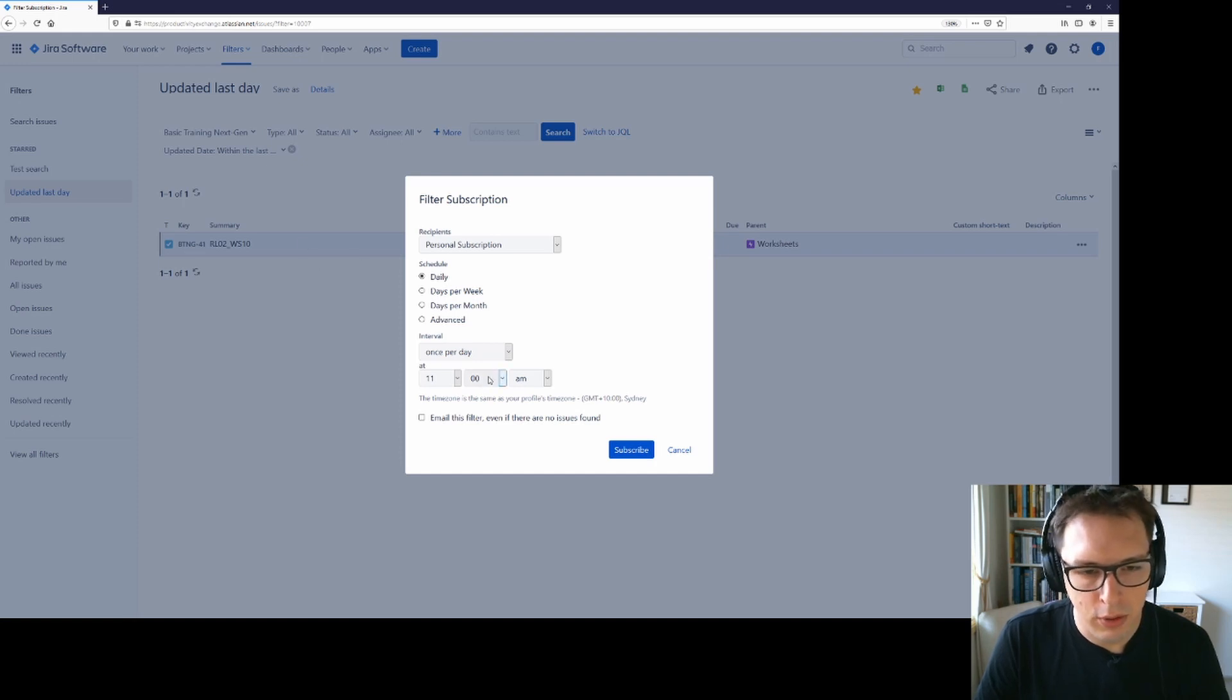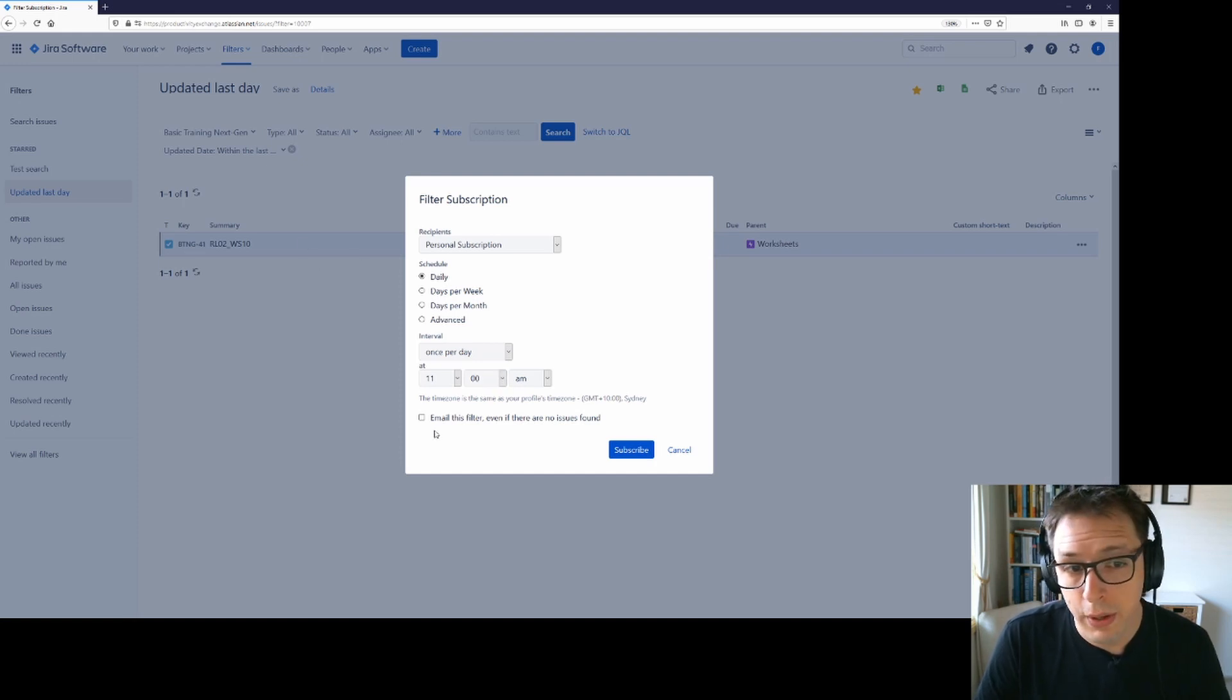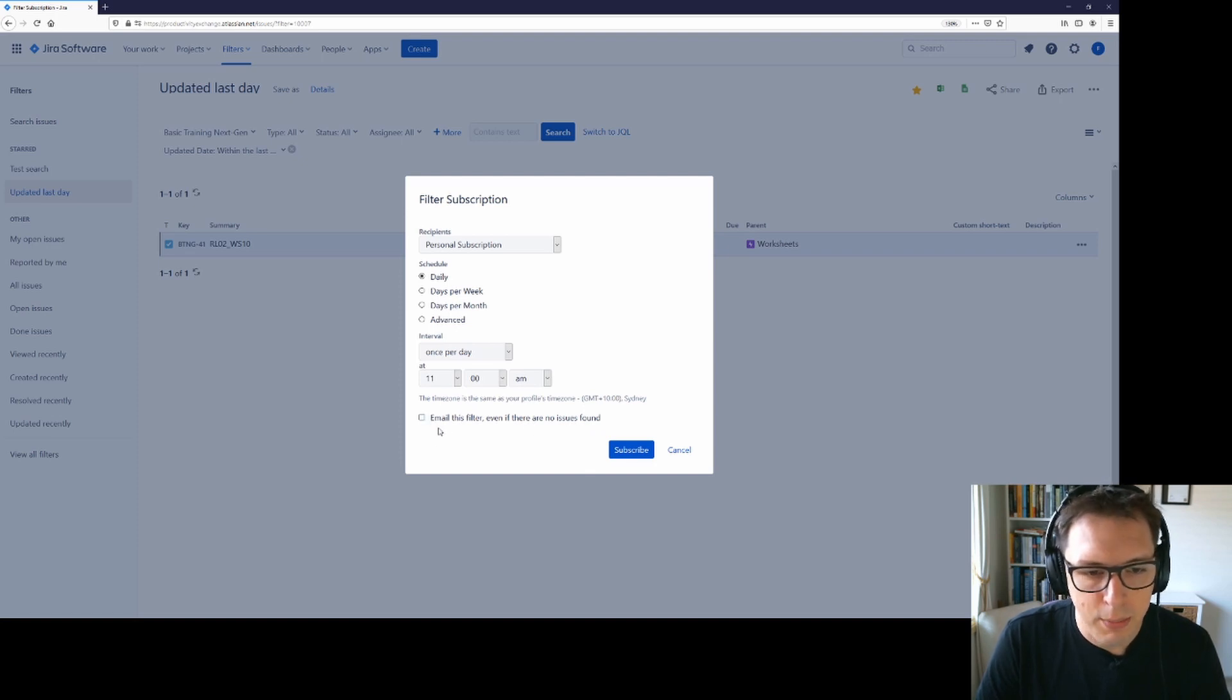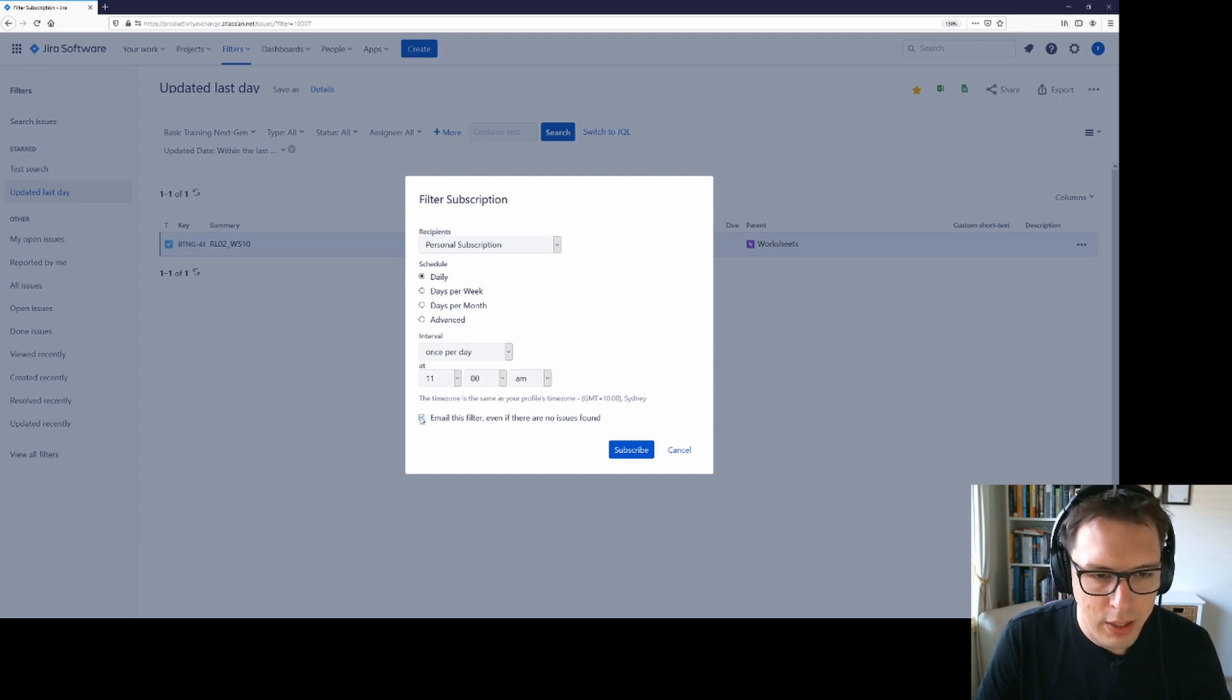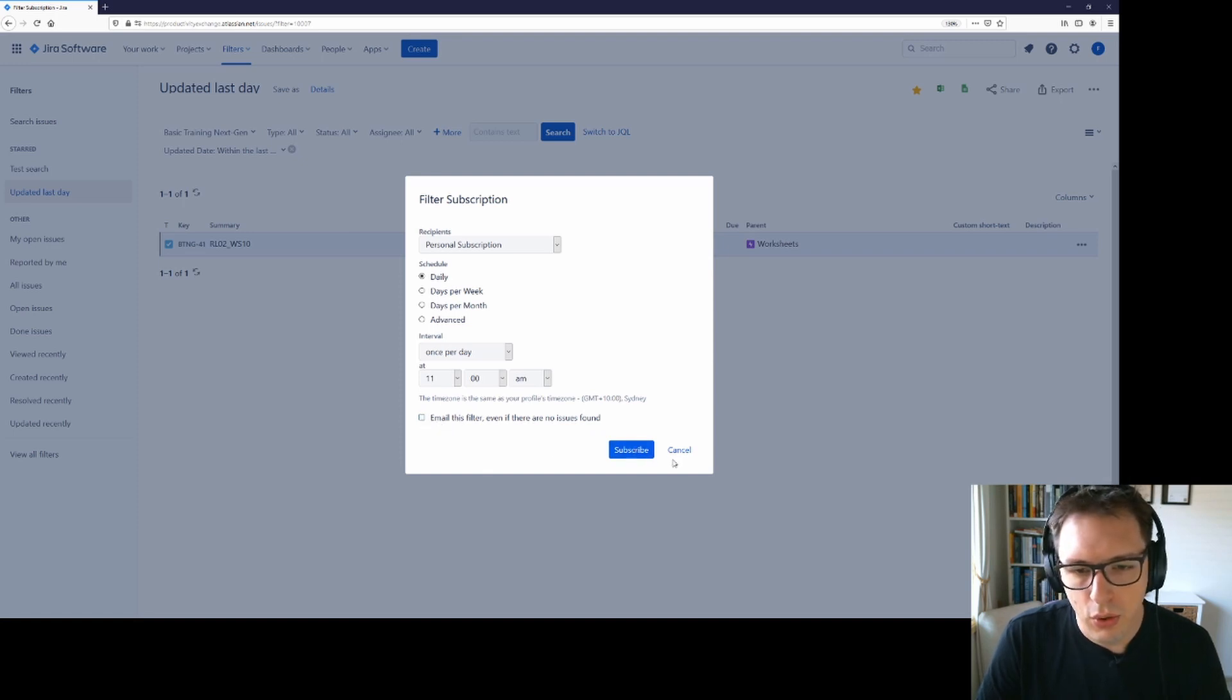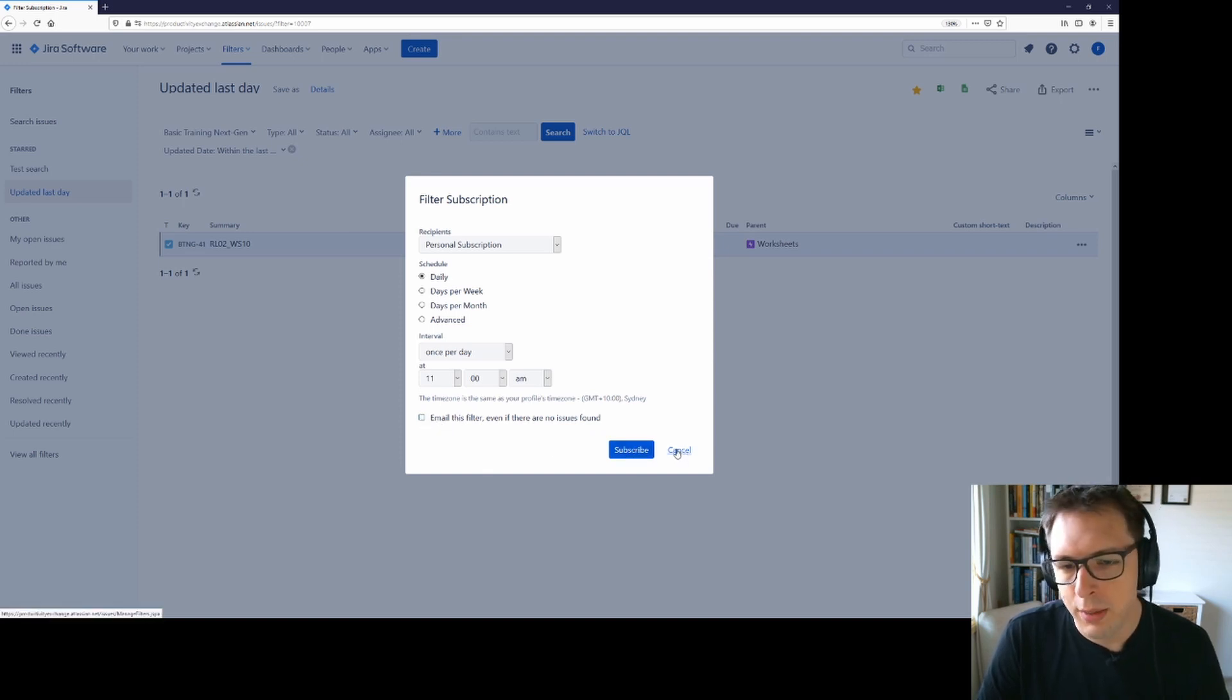This will then email me a list of all of the items that are returned by this particular filter. If there are no issues returned by the filter on a particular day or at a particular time, it will skip that email unless you tick this, in which case it will send you an email and say that there were no issues found. Once you click subscribe, you will receive your regular email updates.